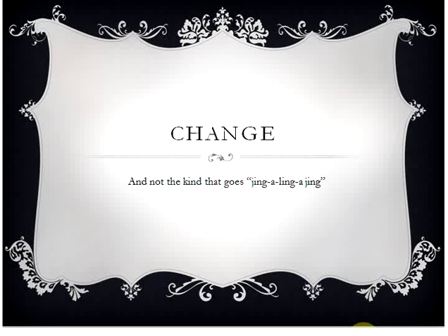It might be very different because the patient was an outpatient in a bed versus an inpatient. That simple of a status difference could affect whether or not my rule or my business process management application returns the correct information. So by providing me that information, we then use that change control document as a communication tool. They give me the information that says it doesn't work. I can manage the change control by sorting it, making changes, communicating the change that I made to fix the issue, and notifying them by returning this document that the change is ready to be retested.